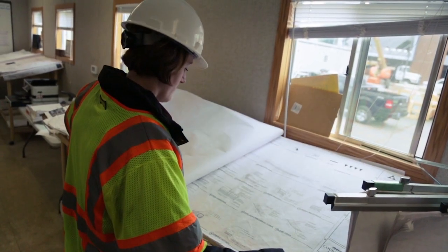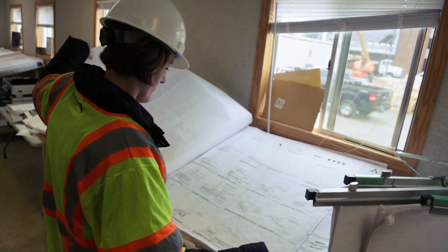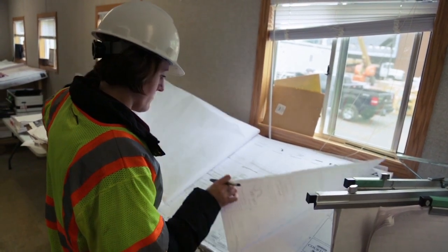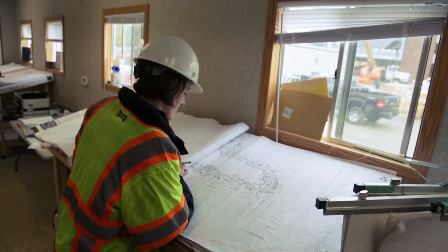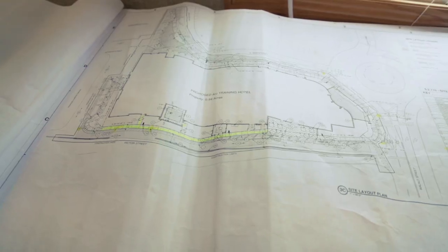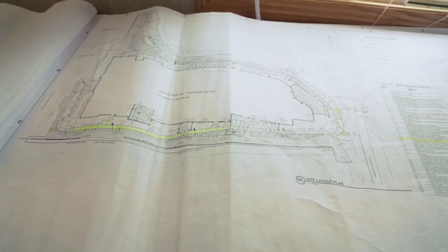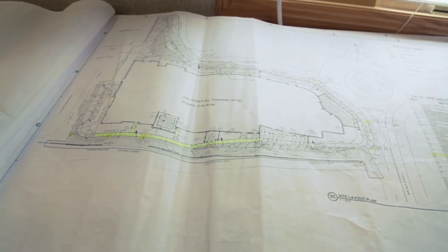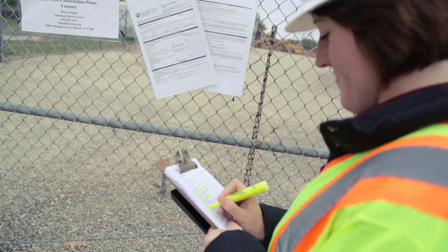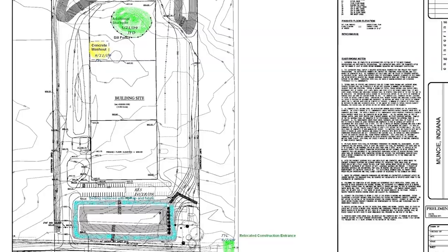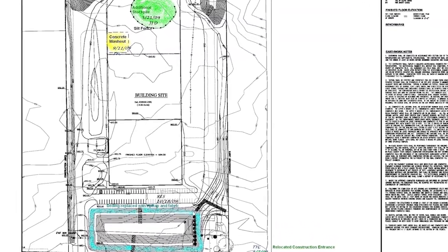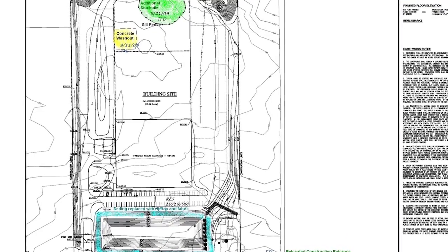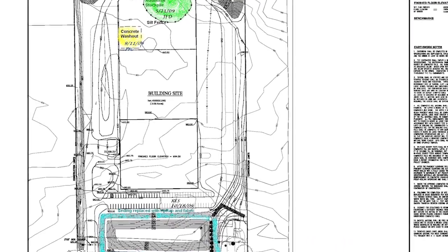Familiarize yourself with the Stormwater Pollution Prevention Plan or SWPPP, outfalls, point of discharge, and best management practices or BMPs for the present stage of active construction. For example, excavation, soil export, soil import, landscaping, grading, or inactive. Keep a copy with BMPs highlighted or GPS'd. Keep in mind that the SWPPP is a living document and that modifications to the plan may occur throughout the construction project, including the use of additional and/or alternative measures.